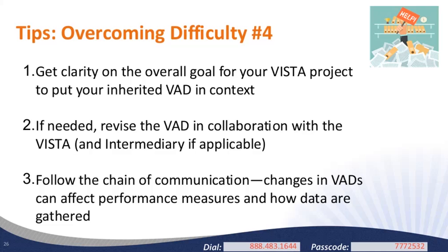And then finally, one more note on changes. The overall goal cannot change, obviously, because that's the goal of your project, but specific objectives, activities, and steps can be adjusted. So again, just check in with your state office before you make those changes. What we don't want to see is changes in your VAD that affect performance measures and how data is gathered. So that's why it's a good idea to check in with the state office. And then Rachel's going to share a couple of resources that you might find helpful when adapting an inherited VAD or any VAD in general.